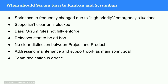When does Scrum turn into Kanban? When the sprint scope frequently changes, priorities change, emergency situations arise, or clients are not responsive — these are signs that maybe Scrum isn't the right way to work. Maybe the team is okay with Scrum, but the stakeholders might not be. Stakeholders are a contributing factor when choosing the right agile framework, and this is easily identifiable at the end of a sprint.